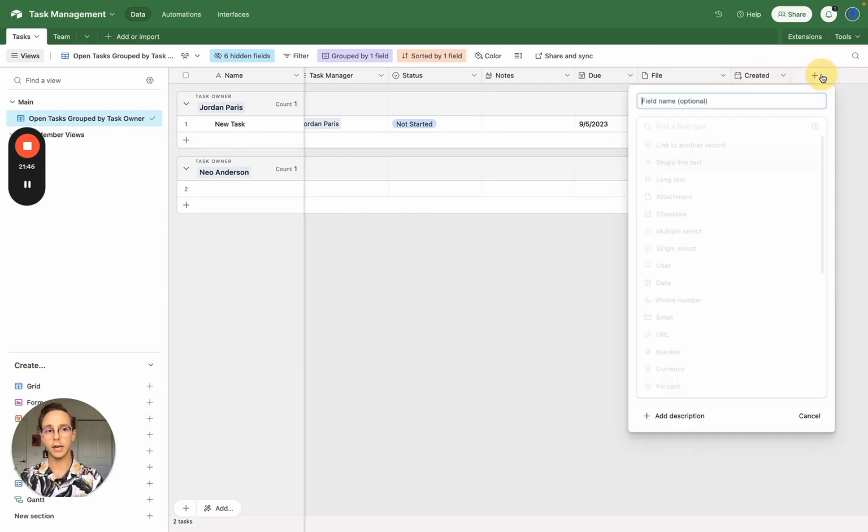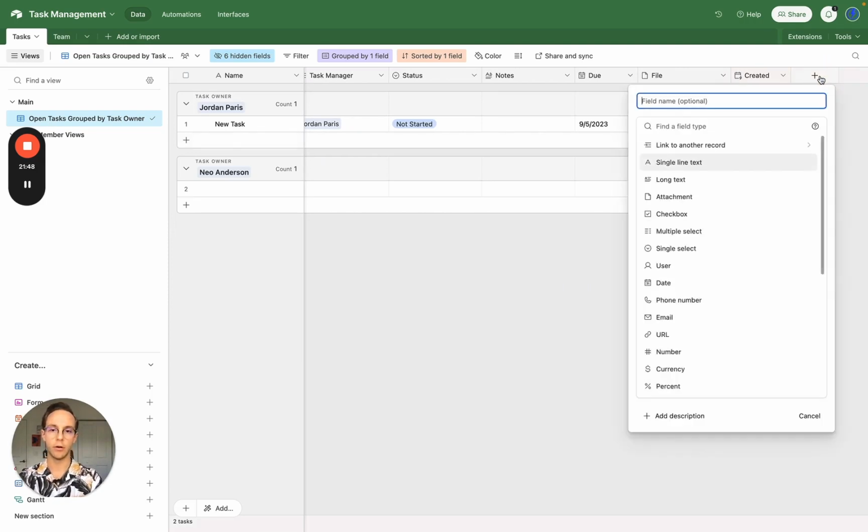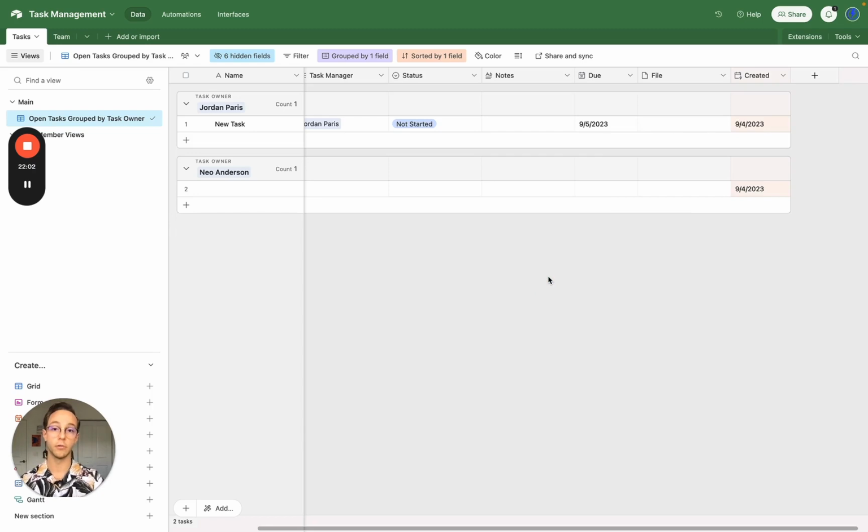You can also create a different field here called priority. And what I like to do for that is low, medium, high, and then P0, which basically means priority 0, due right now. So those are the 4 priority levels, and you can also sort by that.